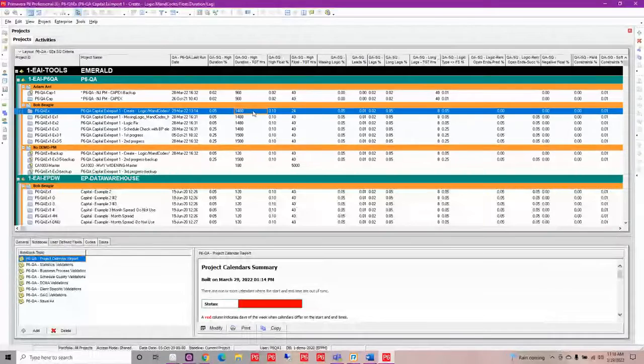In the case that I wanted to set a different duration on a different project, you can see that we've got different values for what we define as high duration on these. I would simply click in here and change this to something different, to have it look at a smaller duration and flag it, saying that I want to look at that smaller duration instead.